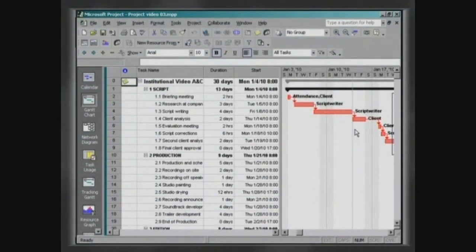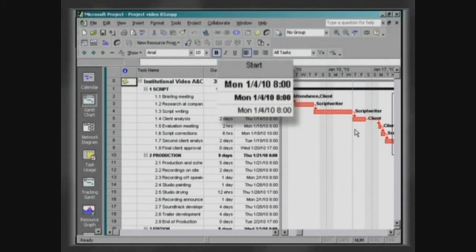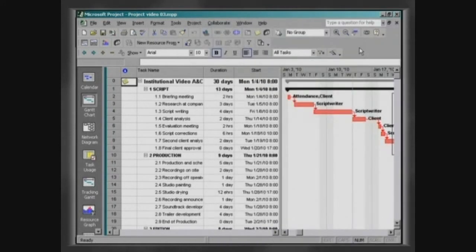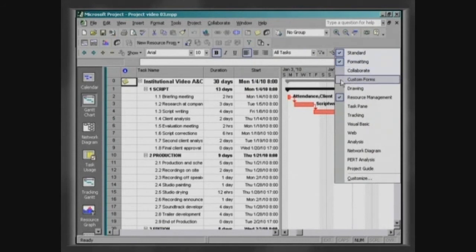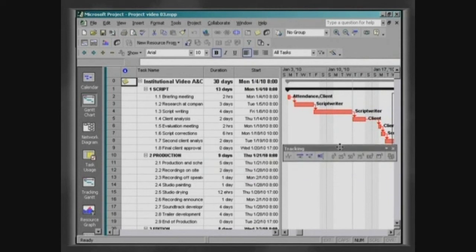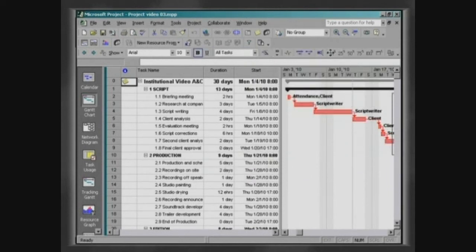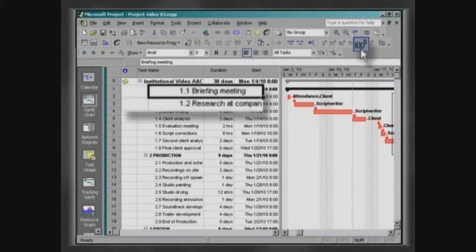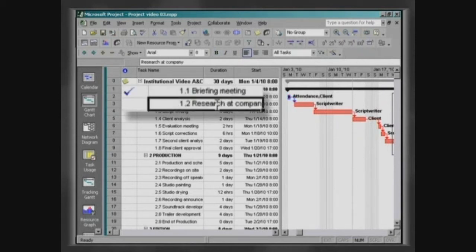Our project started on the scheduled date and it is now January the 14th, the date signalled by a dotted line on the Gantt chart. Click the right button of the mouse on the toolbar area and choose Tracking. This toolbar has been specially developed to facilitate follow-up of the project. To determine work progress of a task, just select it and click on the percentage of finish.